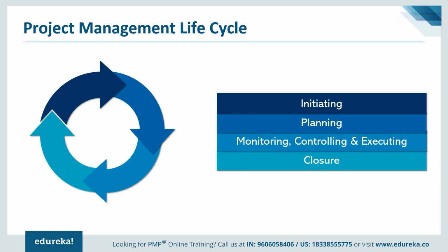And the reason for using the word phase gate is that it helps as a decision point. I would call that a go or no go. Should I proceed or should I terminate? That kind of decision is actually taken at that level. So at every phase gate, we have a choice to relook at whether things are getting delivered as they were desired or there is something to be done separately. So these are a few things we pay more importance to when we talk about project management life cycles.